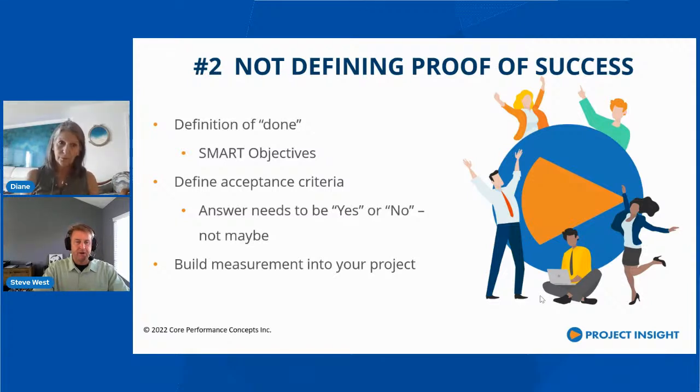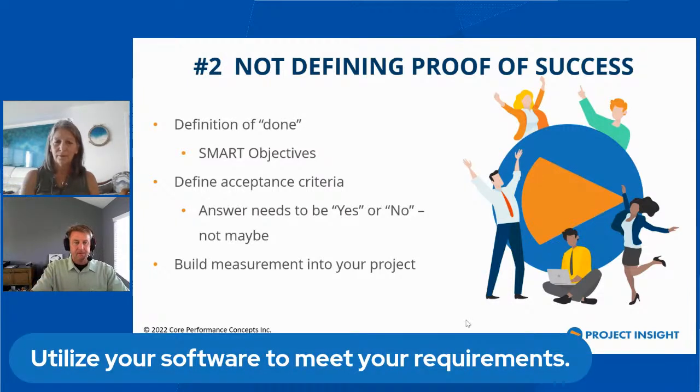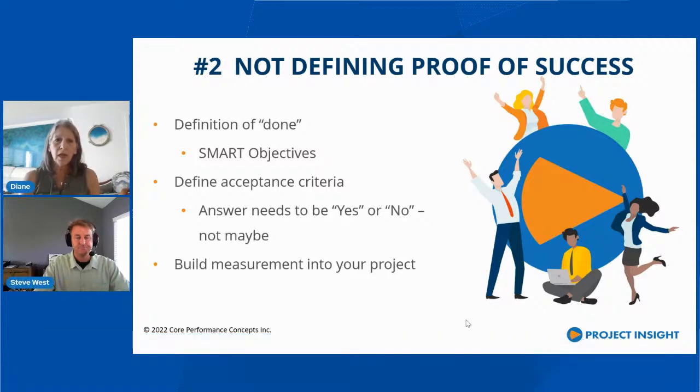So you could, if you wanted to achieve more in some kind of implementation or software project that you're making, just define the three objectives and make smaller projects out of what is a bigger thing, almost like what a program would be, right? Yep. And for those working in an agile environment, this aligns very well with the whole iterative process. So you do iterations. You don't have to swallow the whole elephant today, but you need to know which ones you're trying to solve.